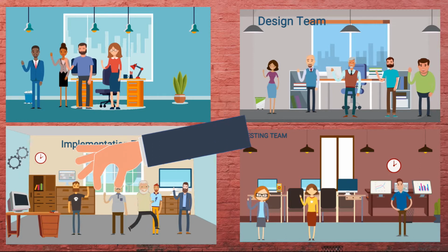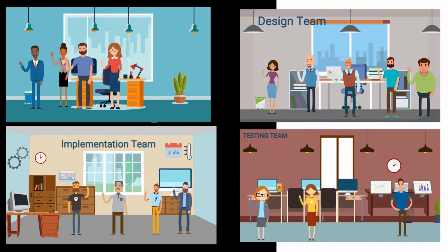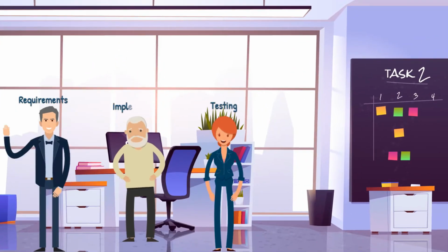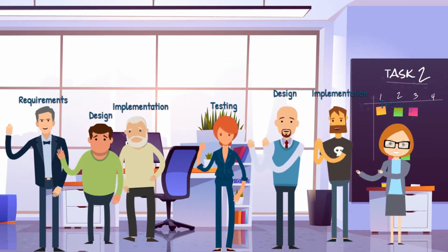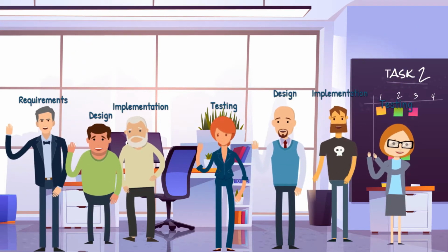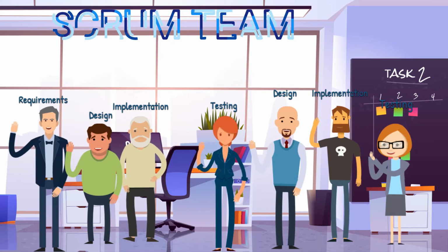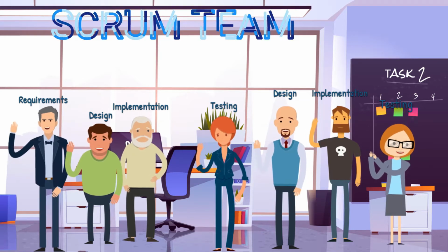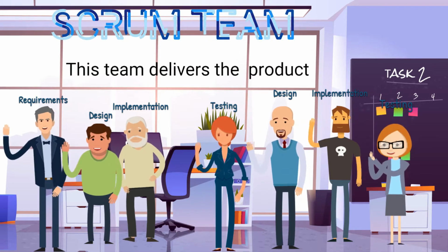You can see this one is a bit resistant. This is quite normal, and it can take time for people to get used to this way of working. Okay, now we have mixed up the team, and this is what we call our Scrum. The Scrum size and mix can vary, but we should aim for around a maximum of 9 people in one Scrum.